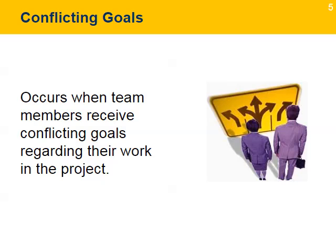Conflicting goals generally occur when an individual or group is given a goal by one person, such as a project manager, that conflicts with the goal given by another person, such as a finance manager. For example, the project manager might tell an employee to get the work done as fast as possible, while another manager might tell that same employee to do the work without exceeding the budget, regardless of time. Project leaders can help prevent these conflicts by ensuring that anyone with the authority to set a goal knows that it may not conflict with other goals.